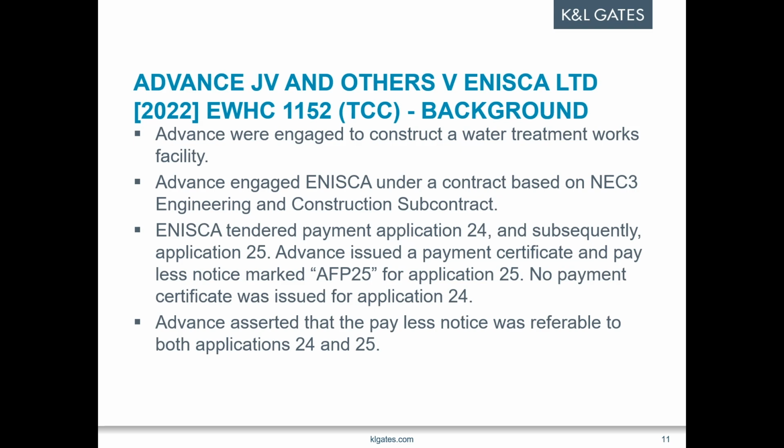On the 22nd of October, NEC submitted application number 24 by email. They included an increase of another 1.4 million, or almost 40% of the project. The last date for providing a pay less notice was the 26th of November. No payment certificate came from Advance. There was no document provided that expressly sought to respond to application number 24 at all.